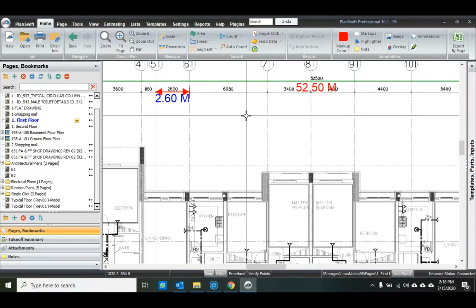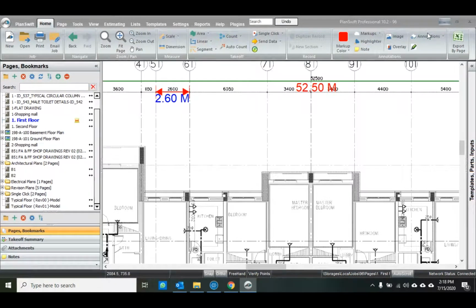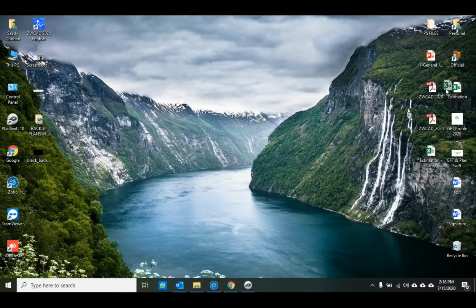And we know that there are few takeoffs that every engineer requires. It doesn't matter if the engineer is from civil or structure or MEP or interior. These are the takeoffs that every engineer requires. The basic takeoffs, which are area, linear, and count. You can prioritize, but these are the ones: square meter, running meter, and counting number. Fine. Now I will keep the software aside and I will show you one example which is common.